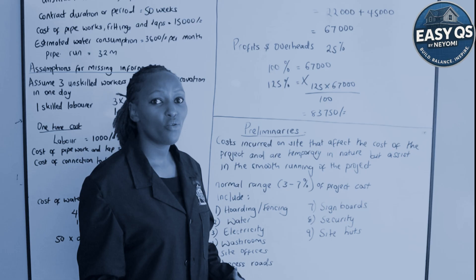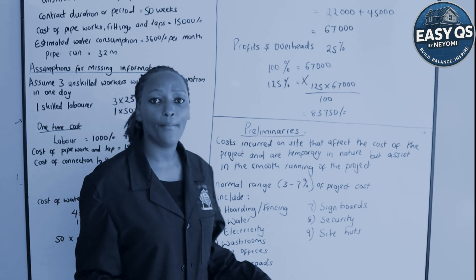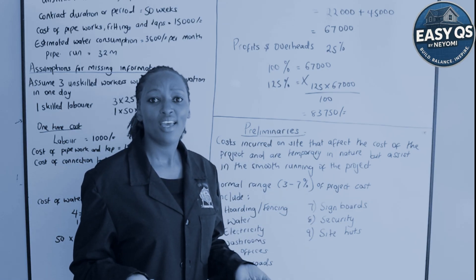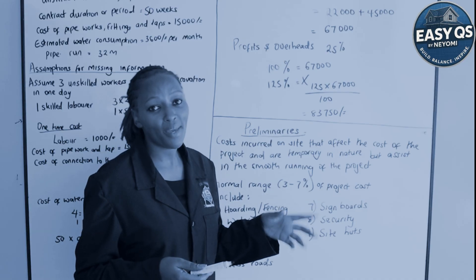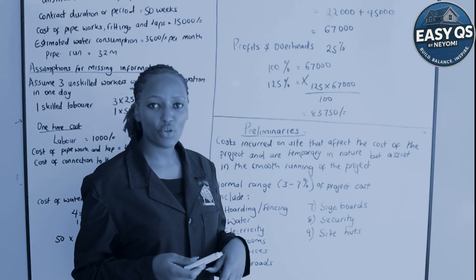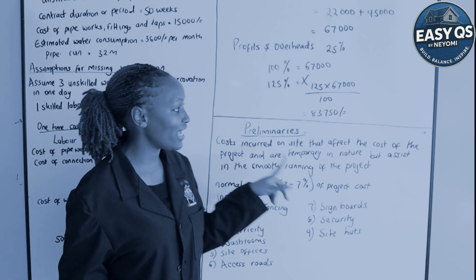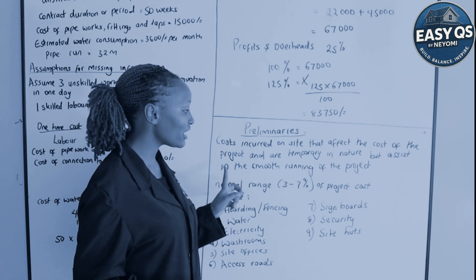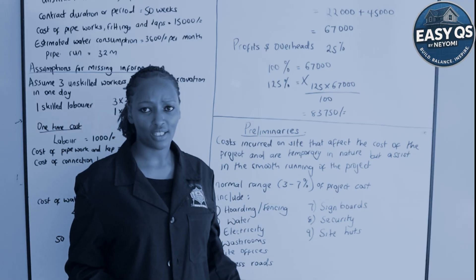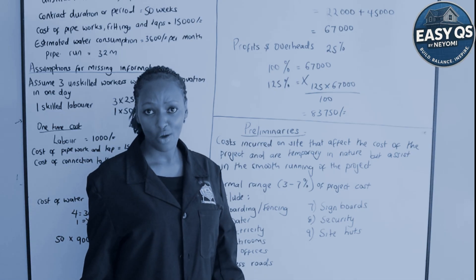Preliminaries are costs incurred on site that affect the cost of the project and are temporary in nature. They affect the project cost but are temporary — we connect or construct them for the convenience of the construction process, and after construction we may do away with them or change them. For example, a mabati fence — a fence made of iron sheets — around the site may be temporary if the client plans to build a perimeter wall later.